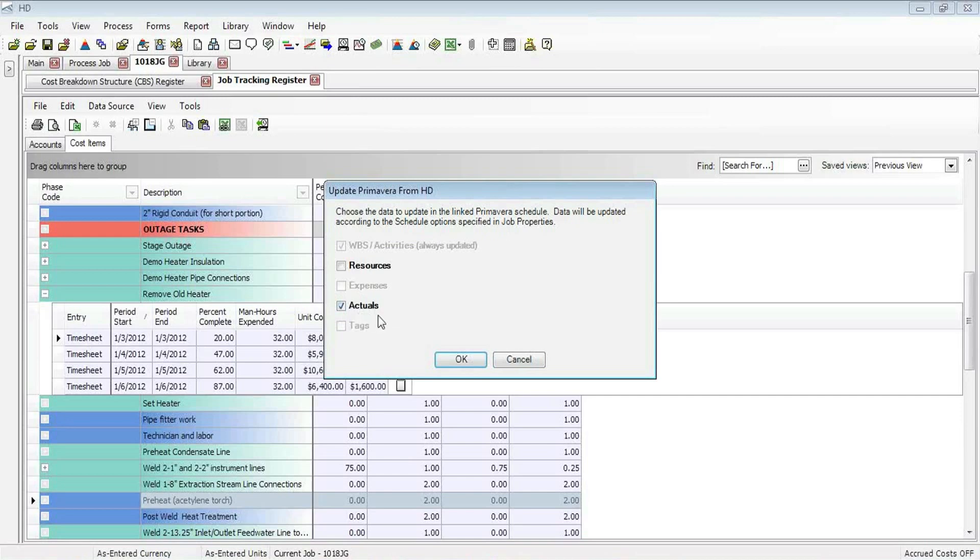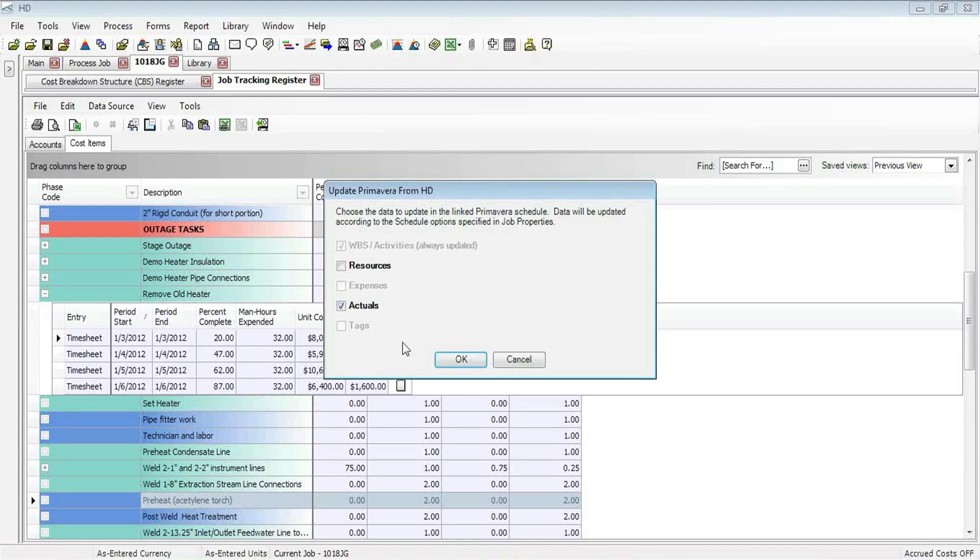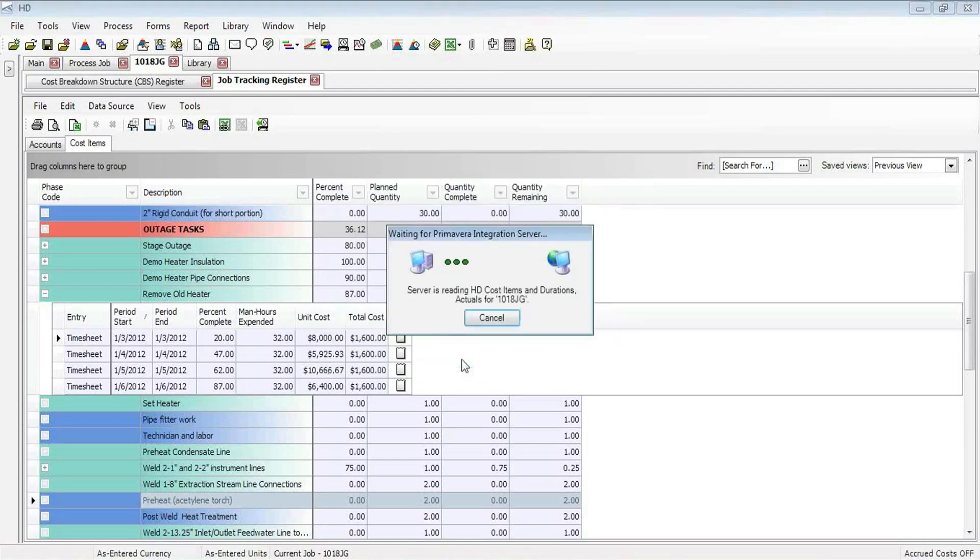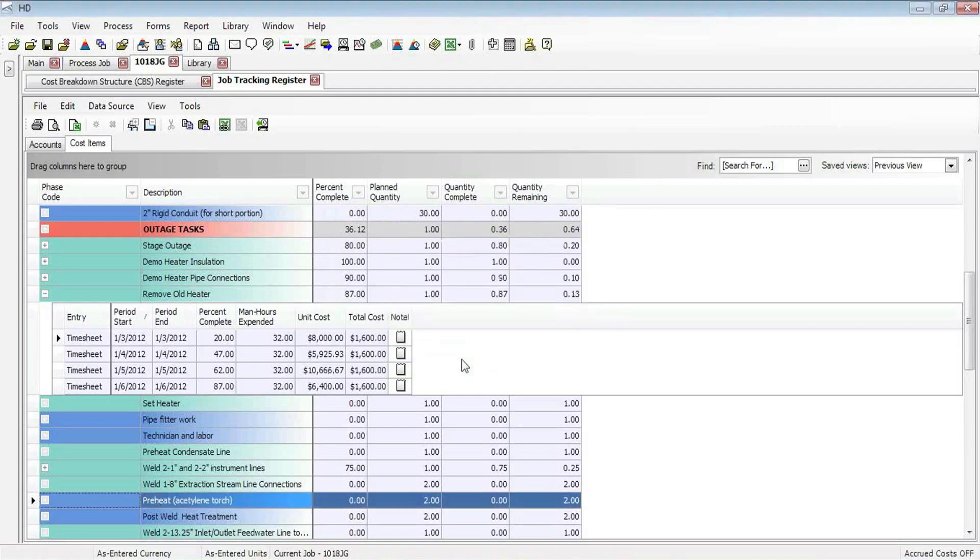Currently, you'll note that the ability to update actuals in Primavera really revolves around physical percent complete at this time. Here we are at the end of 2011. We have future functionality that will allow other actuals, such as man hours, to be able to go into Primavera as well. Right now, we'll just bring in that physical percent complete. I click OK, and we see it in action here. It now is going to update Primavera with that change that I made.